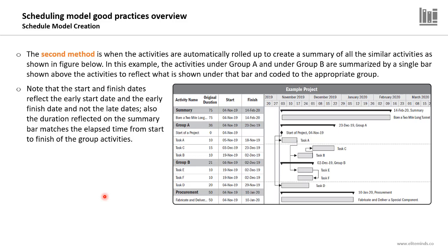Note that the start and finish dates reflect the early start date and the early finish date and not the late dates. So the start and finish of a summary activity represent only the early start and the early finish, not the late figures.